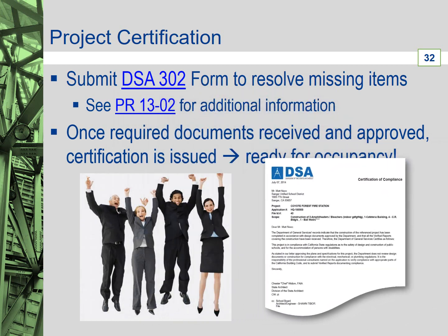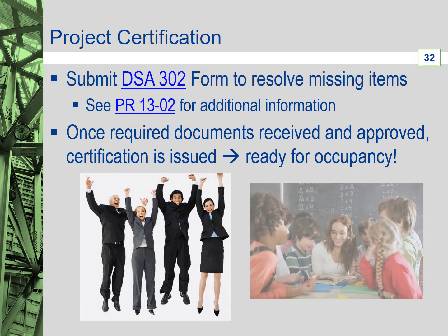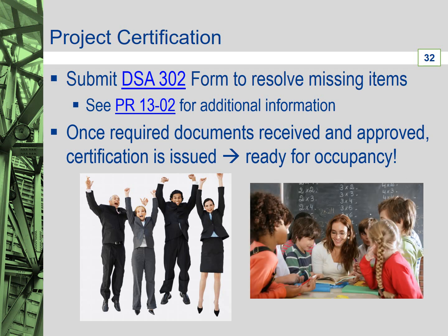Once all of the required documents have been received, DSA will issue a certification letter for the project. Once this is done, the project is considered ready for occupancy since all of the DSA regulated aspects of the project have been constructed in accordance with the DSA approved documents.